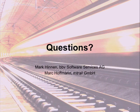So two questions. First is you're saying that you test everything within the team. So you have 8 Scrum teams. So how do you test those interdependencies within those teams? Okay, there's something we call the iteration tests. We have the iteration test phase where we do cross testing every 6 weeks. So it's after 3 sprints. This is in addition to the